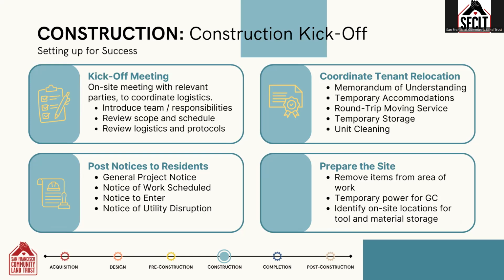We'll confirm daily cleanup, disposal, and safety protocols. We'll confirm any items that are owner procured and when and where they need to be delivered. Confirm invoicing protocols. Hold a question and answer. In this meeting, it's important for the construction manager to take detailed notes and distribute them after the meeting for the record.